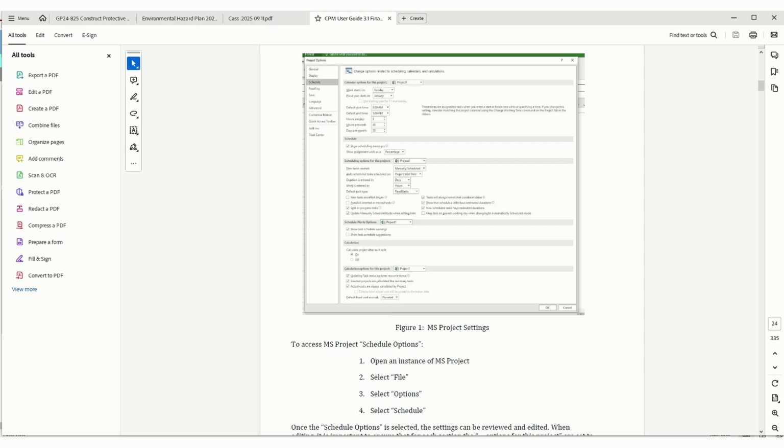Welcome back. This is part 3 of how to create a CAD sheet. Before we get started on our safety, quality control, and environmental plan, I'd like to point something out that I didn't point out in the last video. If you create a CAD sheet where it does not require work elements, and then you change your mind and it does require work elements, and you uncheck it, your crew will be locked like it is in placing formwork.